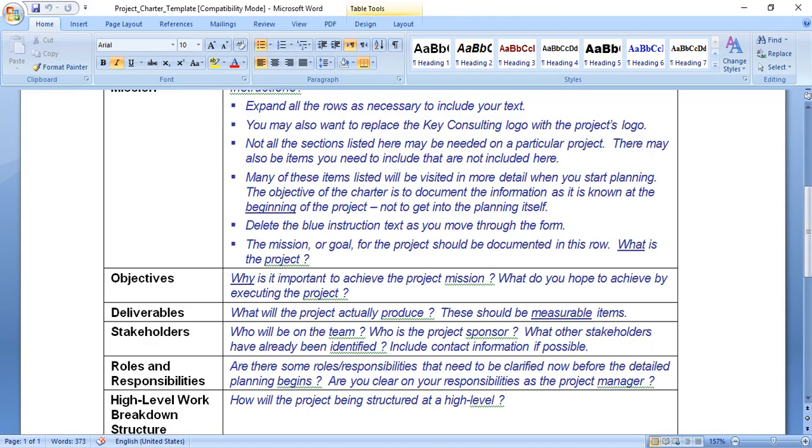Please note the deliverable list within the charter shouldn't exceed 1 page in length. For a large or complex project, list high level deliverables as a bulleted list and attach a deliverable addendum with as many details as are needed.